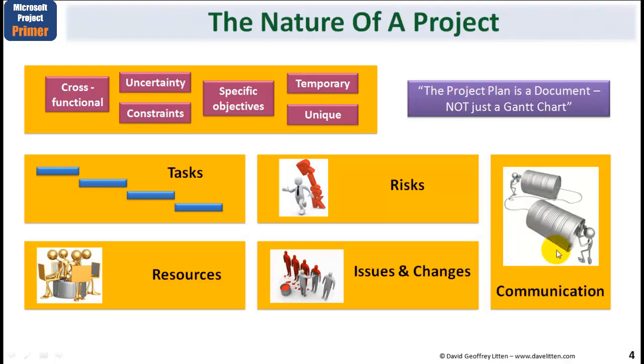Again, how communication is to be carried out, much like issues and risks and changes, will be built in within the project plan. But communication, of course, means tasks and resources, again, so that your project plan will consist within it of a Gantt chart with tasks and resources, not just for the specialist or technical aspects, but also for these as well. I bring this to your attention at this point to remind you that although in the simple exercises I shall be using to help build your knowledge of Microsoft Project, in your real-world projects you would want to include such tasks and resources in order to make it a realistic and achievable project plan.